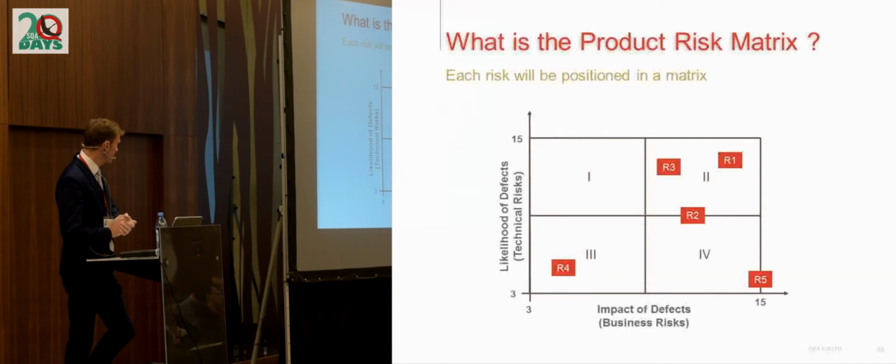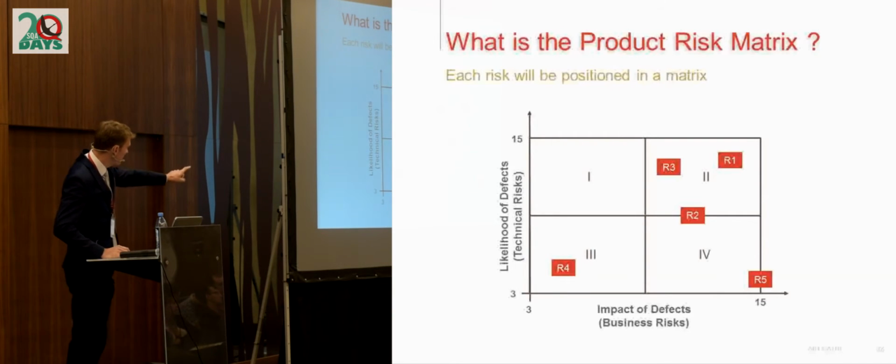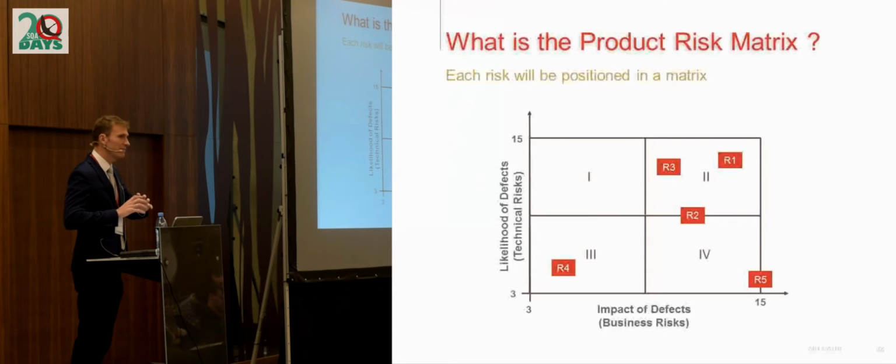A brief comment is that very often when the impact is very high, it's a business risk because there are financial aspects behind. And when the likelihood is very high, it's very often a technical issue, a technical risk.